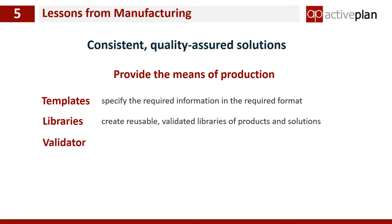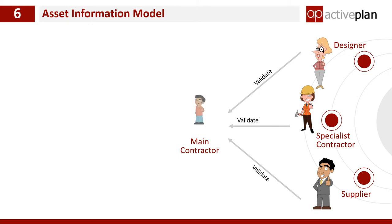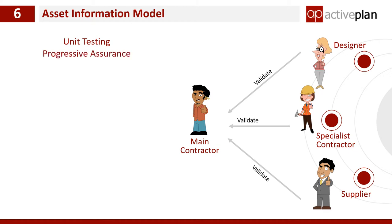We've also created a library management platform so suppliers can create their answers just once, quality assure those answers, and then apply them many times. The final tool in the toolbox is our validation application. Validator allows designers and the rest of the supply chain to validate their own files before they're sent — unit testing in the world of QA. So when the main contractor receives the files from all the different firms they will already have been tested by the authors and any issues already corrected. Partially completed submissions can be tested to ensure everyone's on the right track — this progressive assurance helps deliver a quality assured data model.